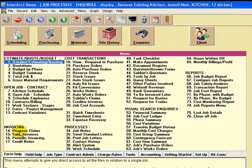Then everything to do with invoicing — there are several ways you can raise invoices against a job: progress claim, which is your RCTI invoicing, normal job invoices, periodical invoicing, and credit notes. The job transactions section is really a subset of what you'll see underneath the accounting menu. In relation to this one job we can see all the transactions that have gone against it and actually enter them here. That might be to view employee timesheets or expense recovery, issue stock to a job, purchase orders for a job, works orders on subcontractors and their claims against those works orders, purchase orders and creditors invoices — everything to do with job cost transactions, all in the one area where we can view them and link to the source transaction.